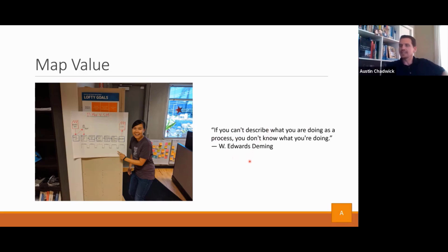And it was quite fantastic to see what things are in the pipeline, so to speak, before something valuable is pulled all the way through the process into production. You could identify the wait times, as you can see here, and mapping it out really helped us start eliminating waste. Even after mob programming, there were still wastes in the process, like waiting for customer or internal feedback, or two mobs handing off things that maybe could be put in parallel. So mapping out value lets you see it visually and take it to the next level.